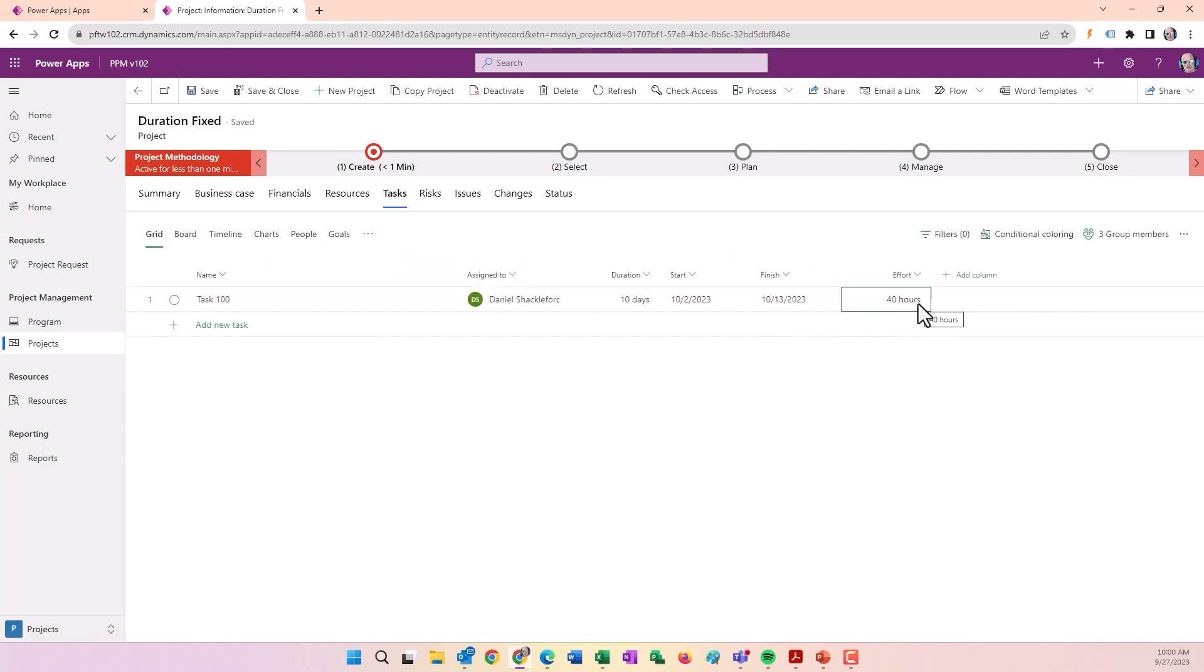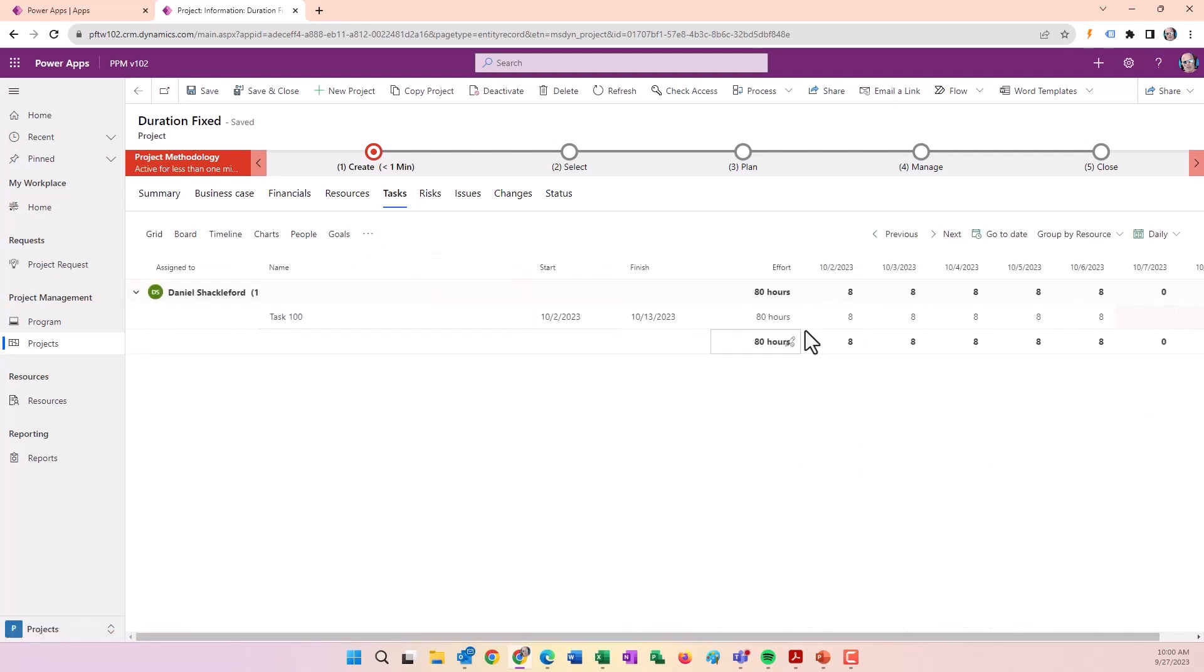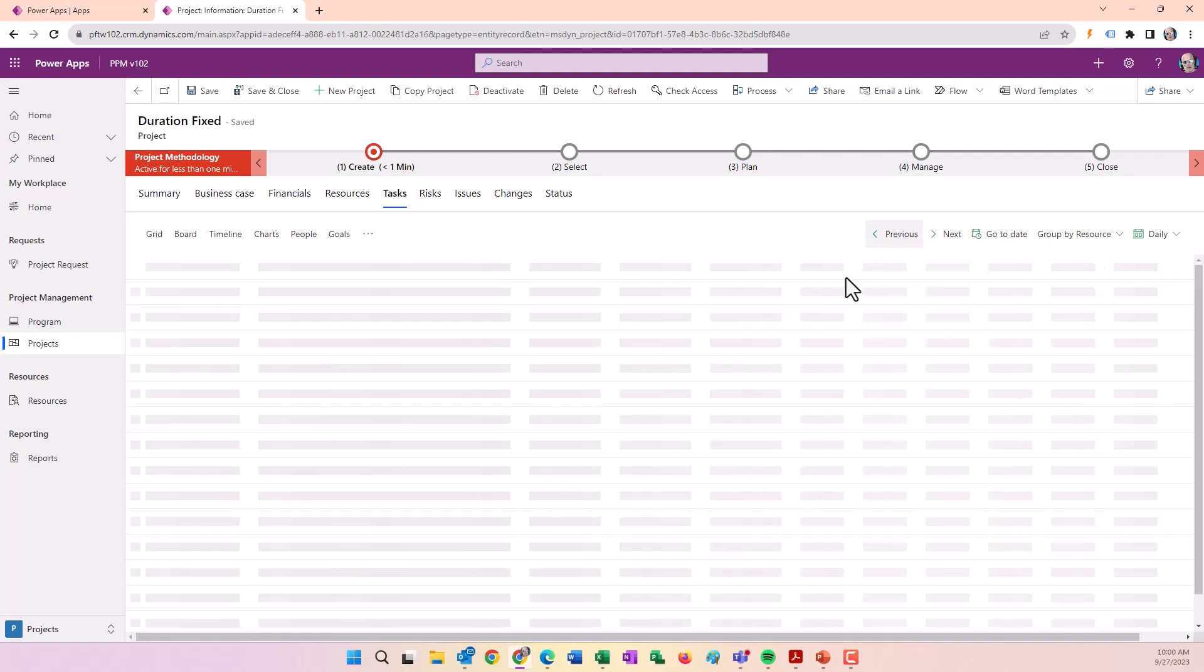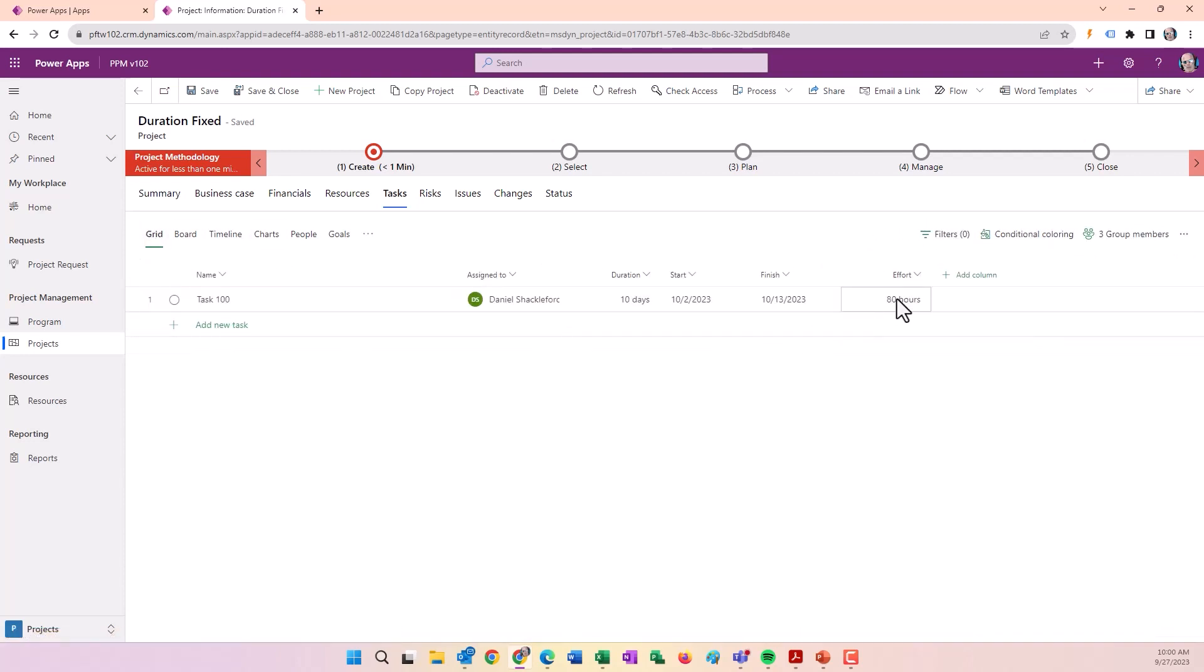Let's change this back to 80 hours. Still 10 days. Now looking at the assignments, it bumped up to eight hours a day. That's because we specified that the duration is fixed and remains unchanged when we change the effort.